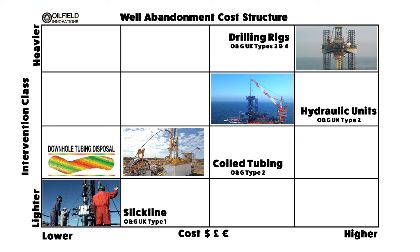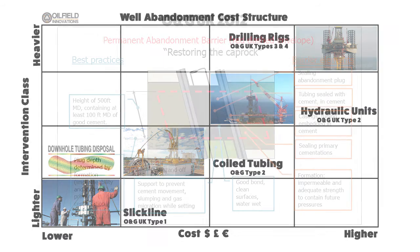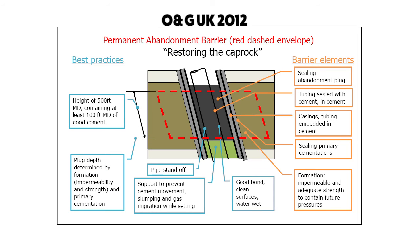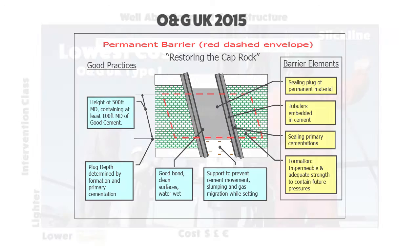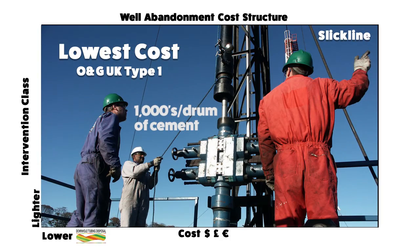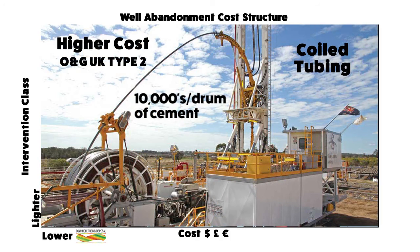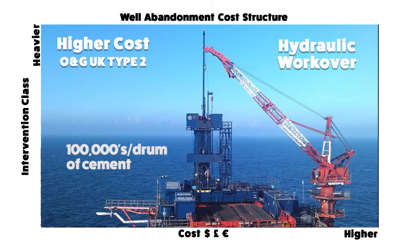The problem is that the industry standard has changed. In the 2012 oil and gas UK guidelines, the tubing can clearly be left within the casing. But in the 2015 oil and gas UK guidelines, the tubing has been removed and it's no longer acceptable to leave it within the casing. This change effectively removes the option to use slickline or coil tubing and pushes all abandonment means towards hydraulic workovers and drilling rigs.